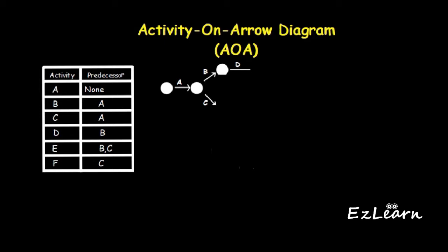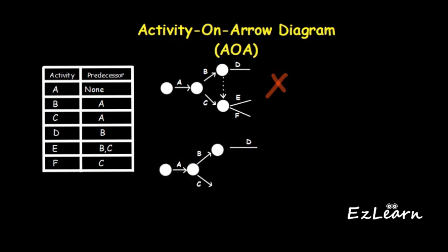So if that's the case, I can do the solution by having activity E. If you notice, if I move B to C here, then activity E will have both B and C as predecessors. Then activity F, the predecessor for it is C. Now activity F also has two predecessors due to this dummy activity. It violates the relationship. But only activity E has these two predecessors. So in this case, I met the requirement for E, that its predecessors would be C and this dummy activity, which shows when C finishes, it also finishes here.